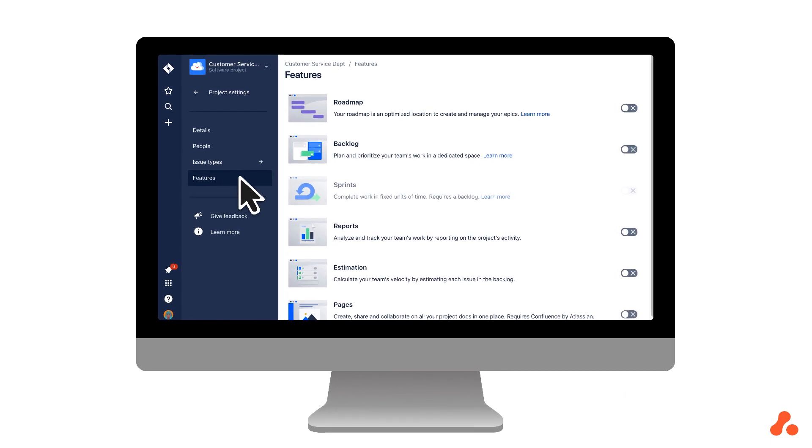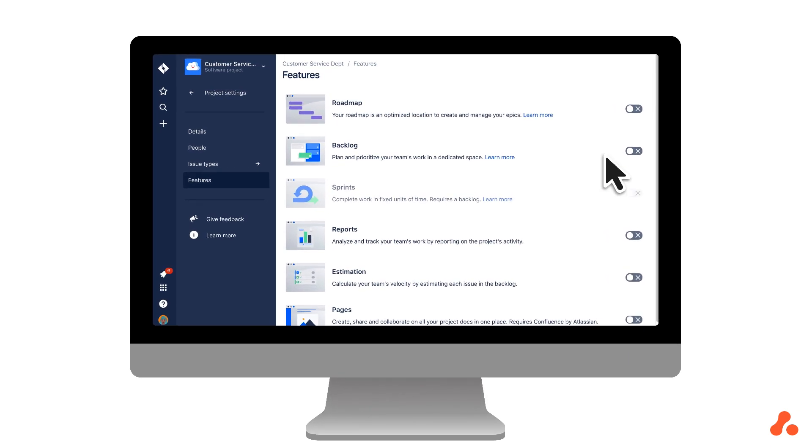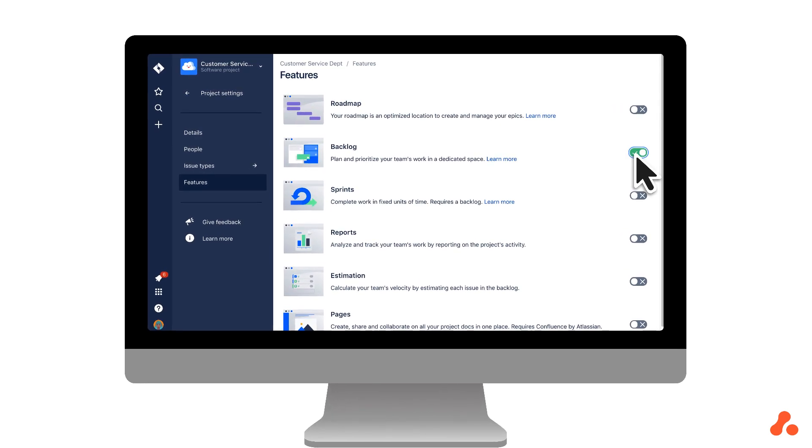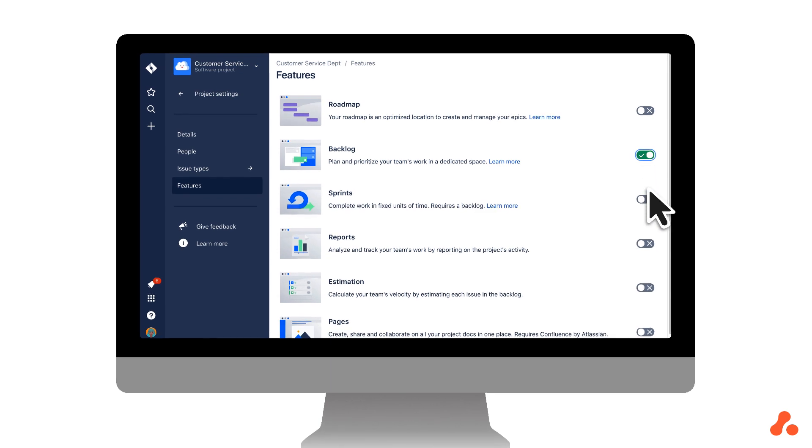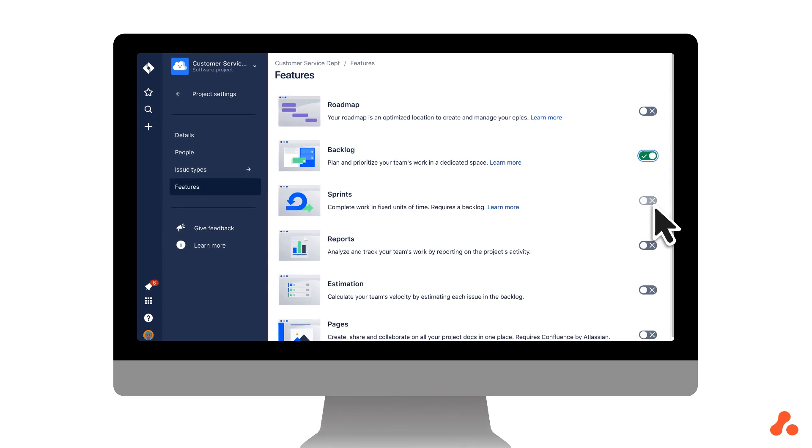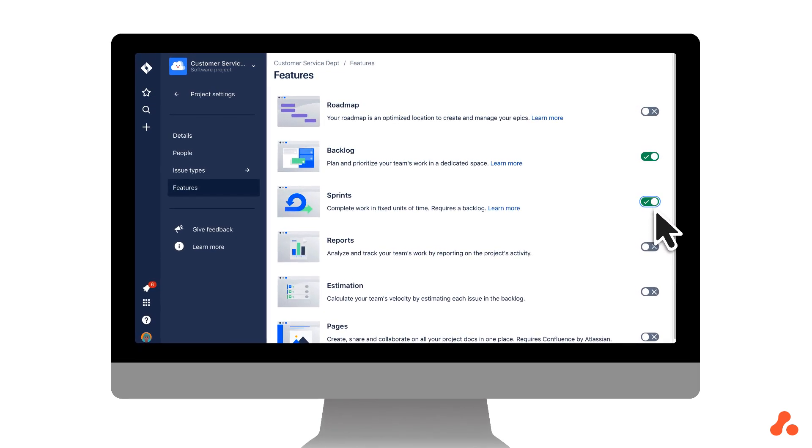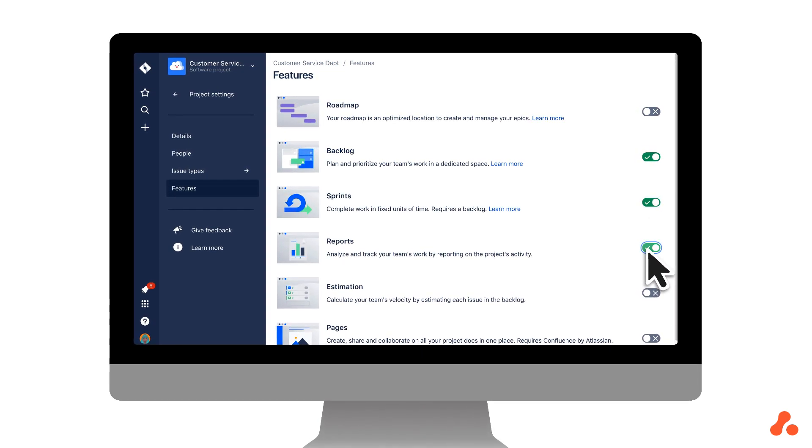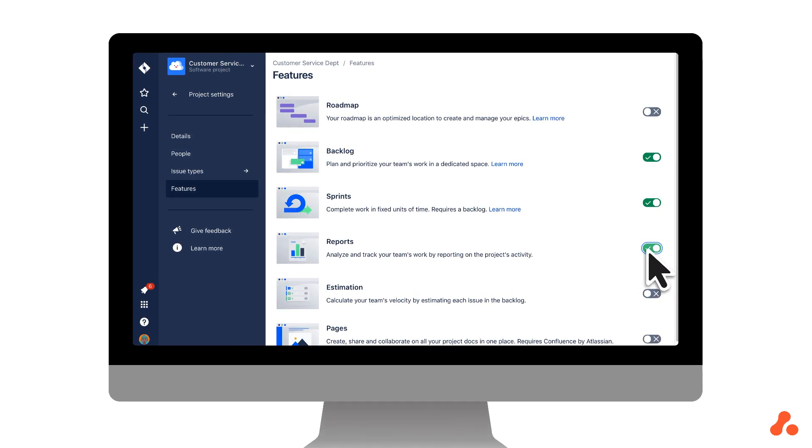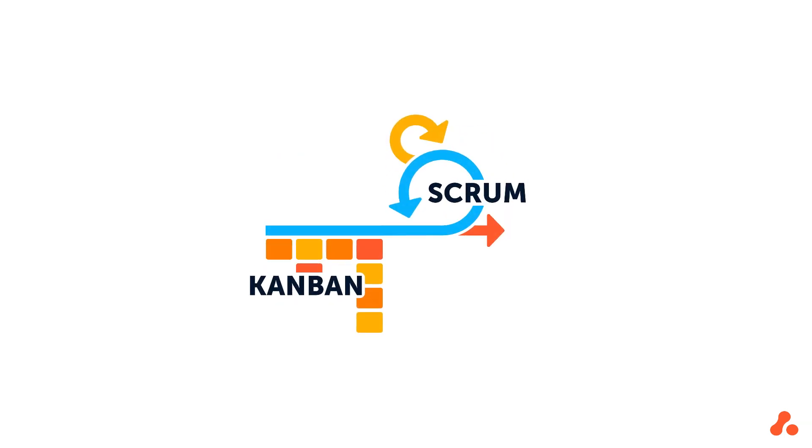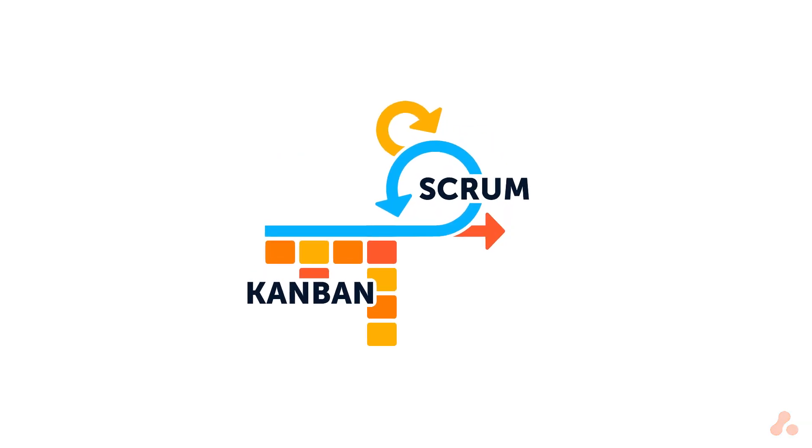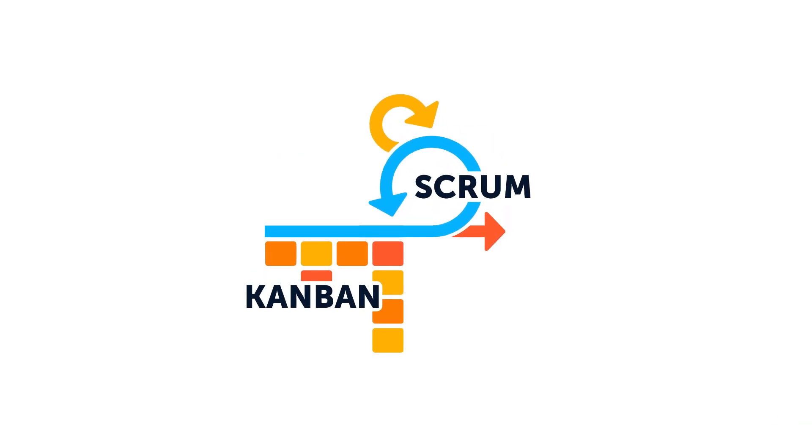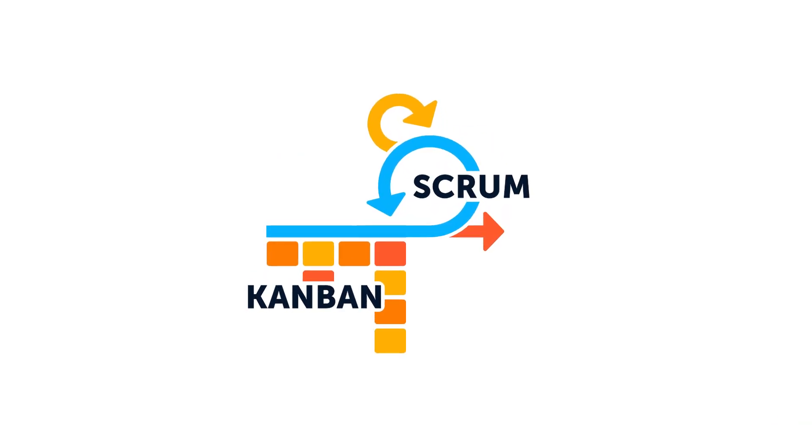Thankfully, unlike budget airlines, these features are free. Toggle the backlog slider, and you're good to go. You'll also notice that you then have the option to turn on sprints and reports too, effectively turning your Kanban project into a scrum project at the flick of a switch. Well, three switches, but who's counting?